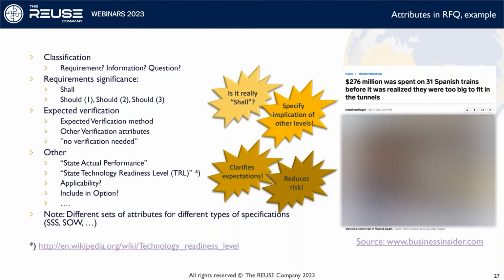They could do one or two things. They could specify by real time, this is what we mean. But then that may be a bit of a problem for some bidders. So they chose to not specify what they mean with real time, but instead they created a question, saying: please bidder, please clarify, please define to us what is your understanding of real time, rather than pushing the bidder to follow exactly what your needs are. We would probably make it easier and cheaper for everybody if we would not over-specify things.